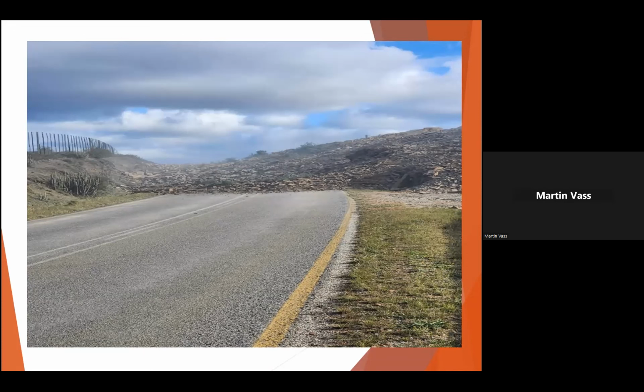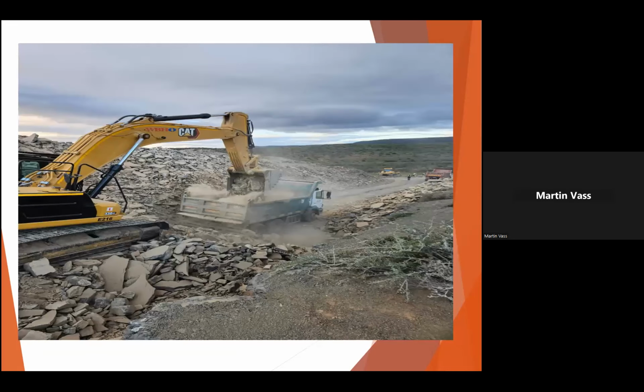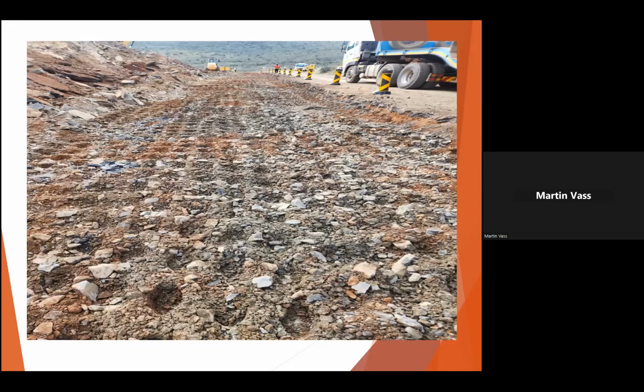And eventually the insurers agreed that it was surrounding property because they closed the road to do the blasting. So they paid under the surrounding property extension to the CAR policy. So what we had to do was take all this material away. And unfortunately, the road was severely damaged. As you see, we're taking the material away there now. We then had to take up the whole road, which was damaged, and redo all the layer works, and then put that road back again.